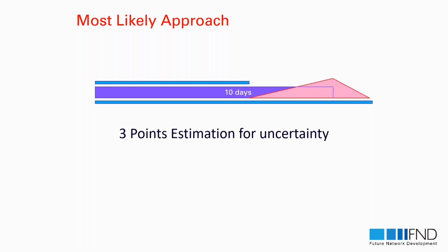So the factors which I have are uncertainty. And the uncertainty rates, you can say, well, 70% and 150%. So we start to speak about the best case, worst case, and most likely case. In this case, I can give 3 points to my planner. Best case 7, worst case 15, optimum is a 10 days job. This is what we call the 3 points estimation for uncertainty, okay?